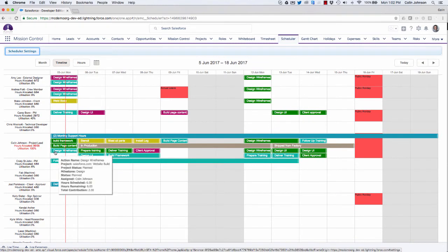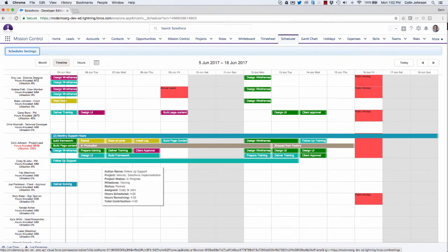On each individual role record, we specify how many hours per week that person is available. Now on my record it specifies that I'm available to work 32 hours a week, so over this 2-week period I should have 64 hours available to me. But you can see it's telling me I've got 58, and that's because I've got this public holiday assigned to me next Friday. So it's automatically reduced my availability to reflect the time that I'm taking off.